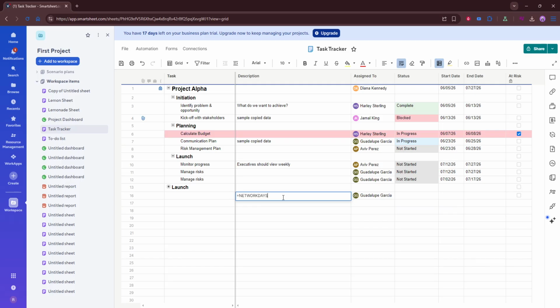If you need to exclude holidays, you can add those as well. This is a helpful option when you want a more accurate result, especially for business scheduling. Including holidays prevents Smartsheet from counting those dates as working days, which can make your timeline calculations much more realistic. If your team already tracks holiday dates in a separate range, you can reference that in the formula.